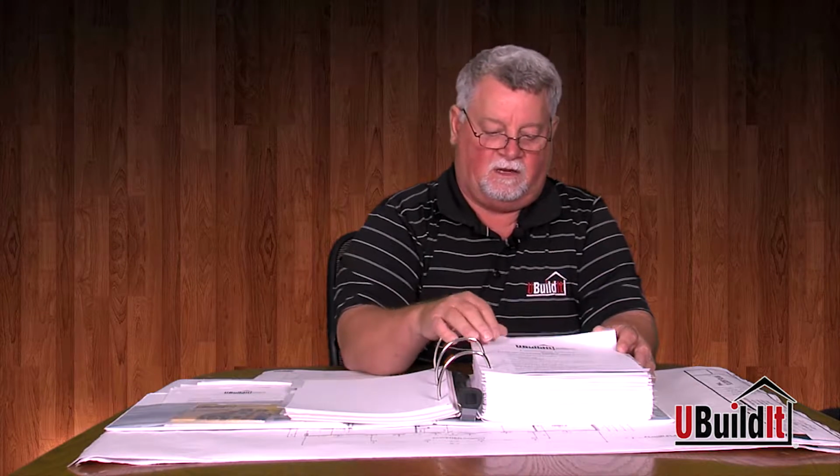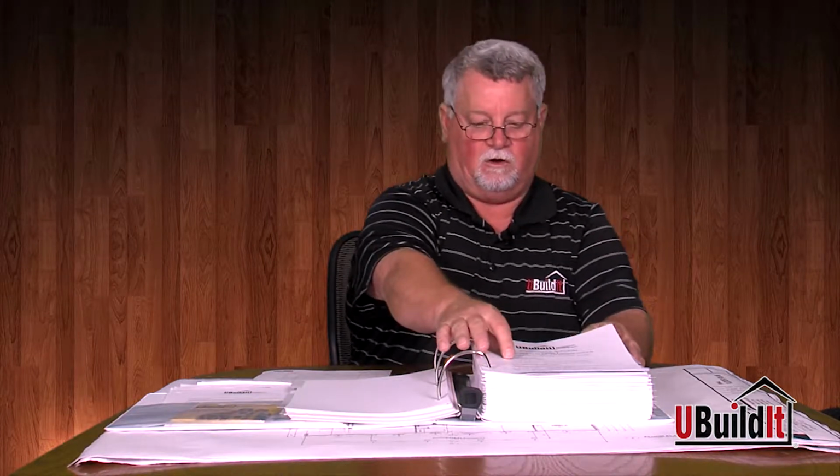So what we want to do is be sure that we're staying ahead of the game and find out the availability of the brick early enough in the game. Usually on perfect conditions from this day forward, you're ready for brick in about 2 months. You don't want to all of a sudden start looking for brick when you're ready for brick. You want to already have that brick ordered.